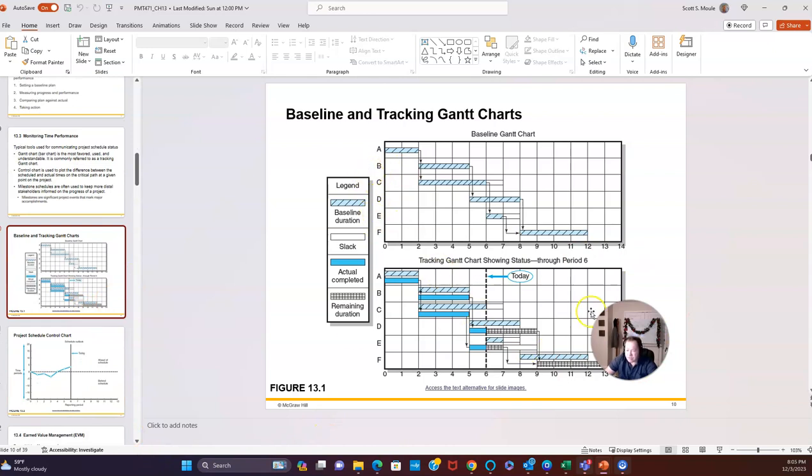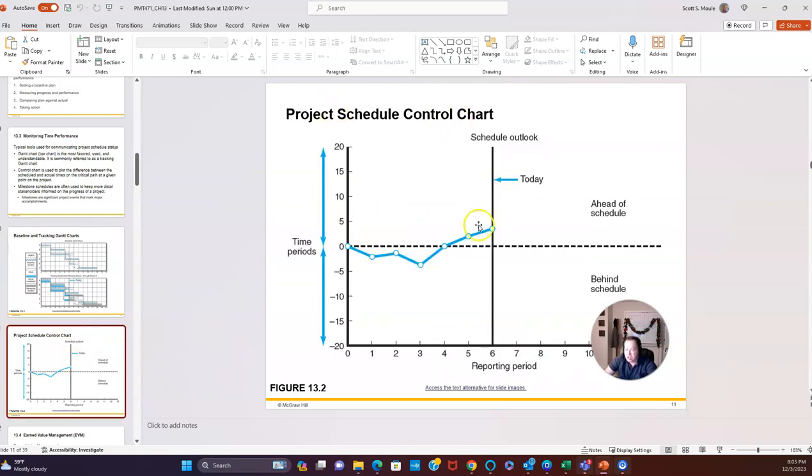So throughout this project, what you're doing is every week or 2 weeks, you're meeting with the team, you're finding out how they're progressing with their work, and you're tracking it. And what you do is you create a control chart. So this says at 1 month, you should have X completed based upon your Gantt chart.